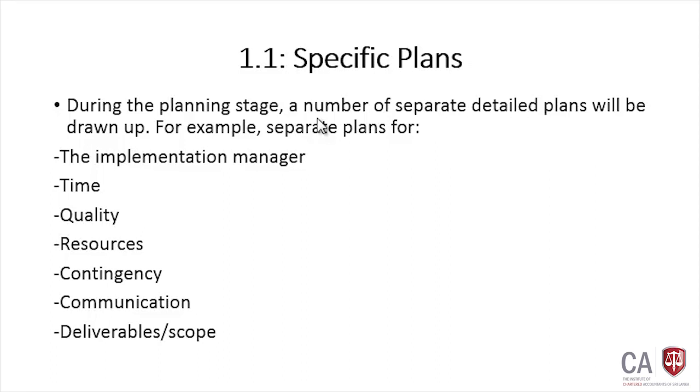Then the contingency. Contingency planning includes deciding what additional activities, cost and time need to be added to the plan to ensure a reliable budget and completion dates, right. If something unexpected happens, how can we deal with that? That will be identified under the contingency plan. It's better to identify a risk register also. With the risk register, we can identify what type of risk we will face. Then we can identify the appropriate strategy to deal with a particular risk if it arises.